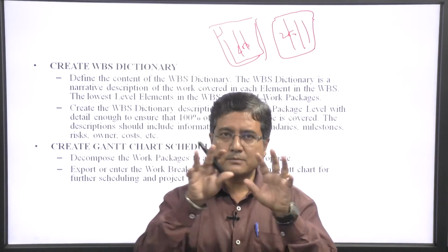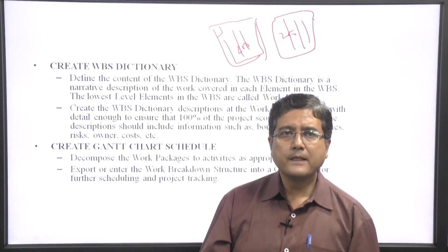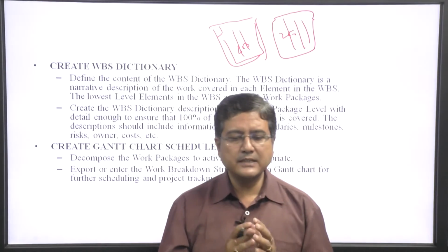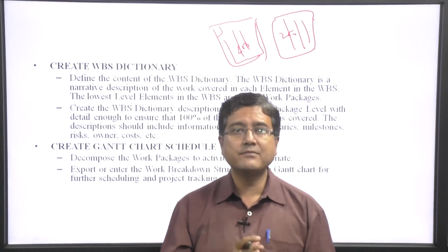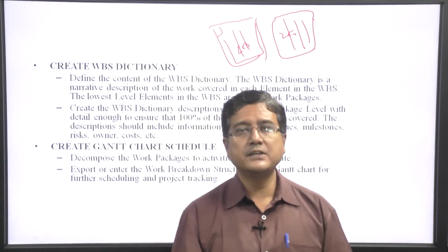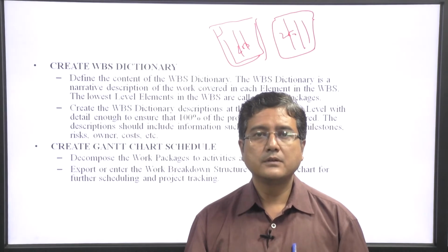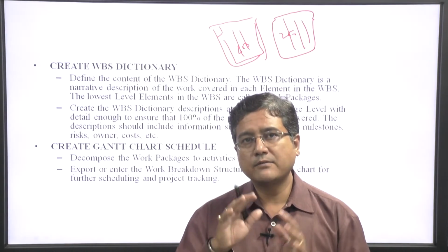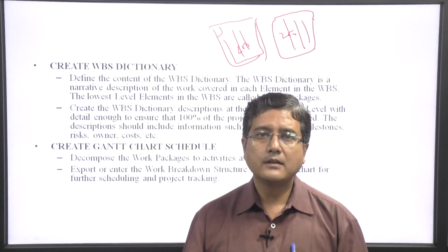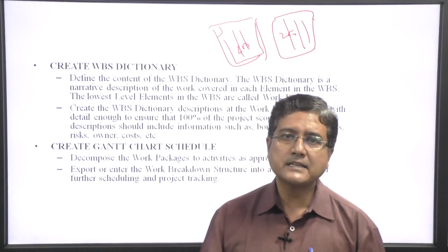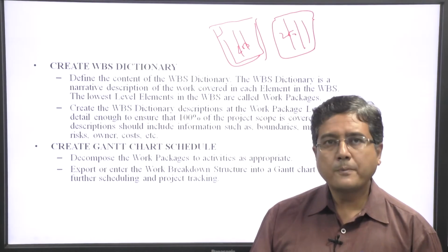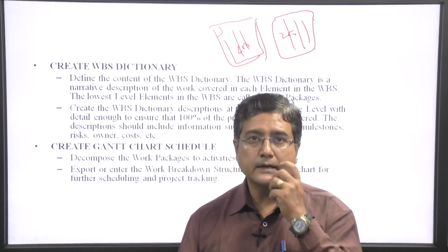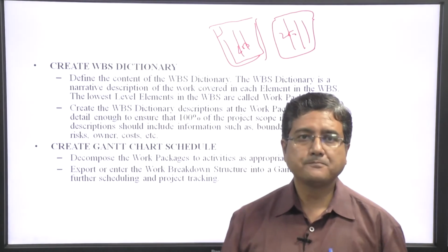So, this is about the small task of work breakdown. Then create the WBS dictionary, define the content of the WBS dictionary. The WBS dictionary is a narrative description of work covered in each element of the work breakdown. I just make a report of what I covered and how many days I took to handle it, so when I get a similar proposal from another client, I can use it.